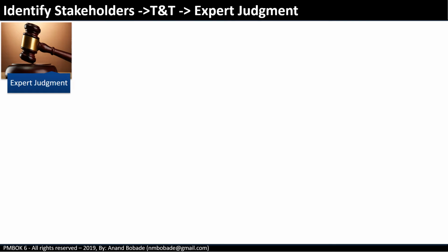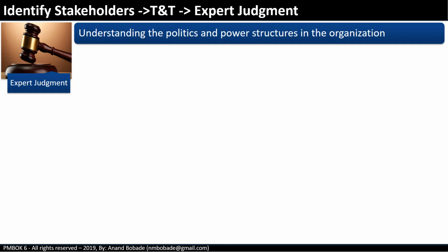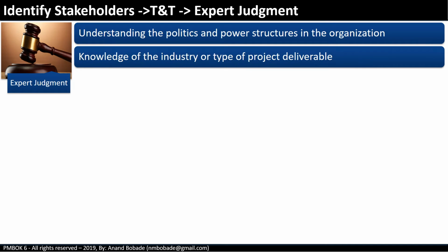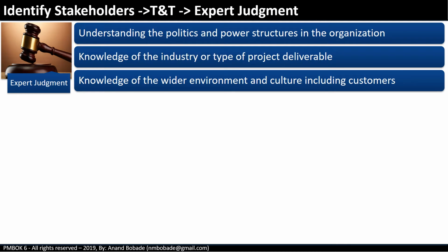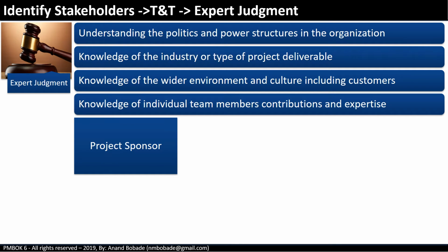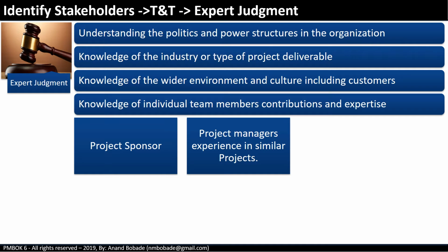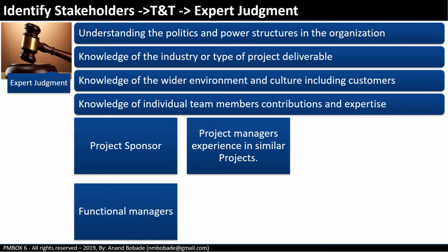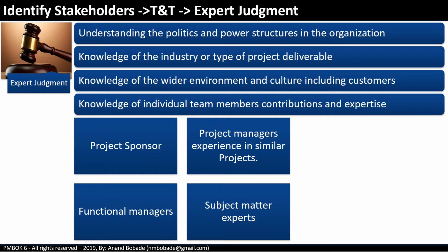Expert judgment: expertise should be considered from people who have specialized knowledge in understanding the politics and power structure in the organization, knowledge of the industry or type of project deliverables, knowledge of the wider environment and culture including customers, and knowledge of individual team members' contribution and their expertise. Expertise may come from the project sponsor, a project manager experienced in similar projects, a functional manager, or subject matter experts.